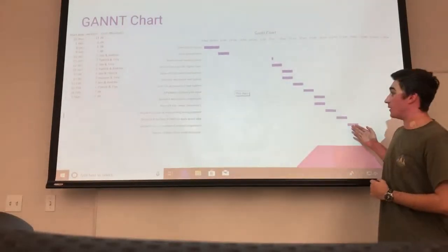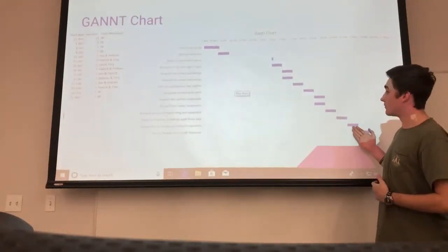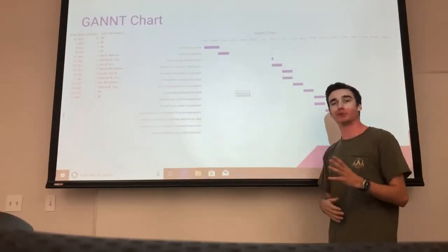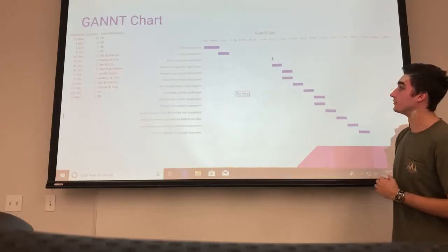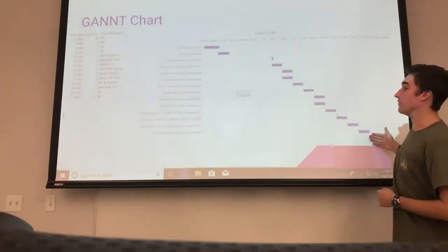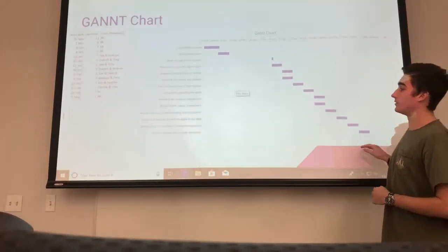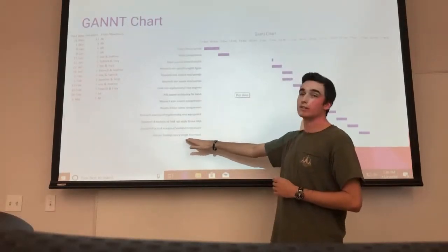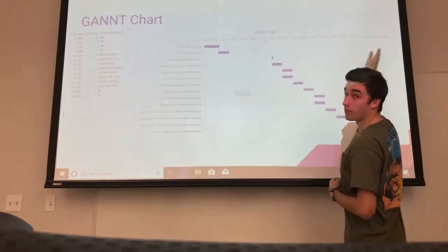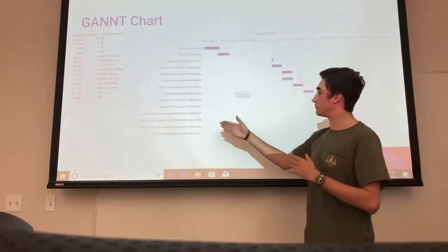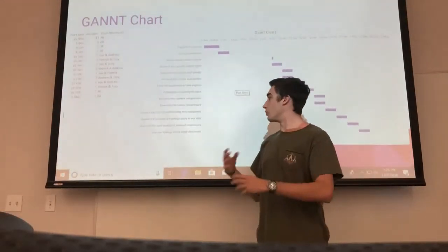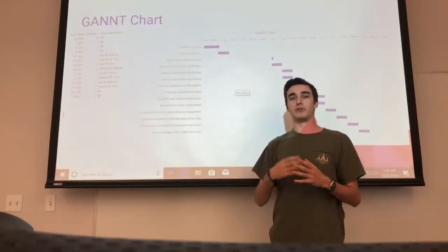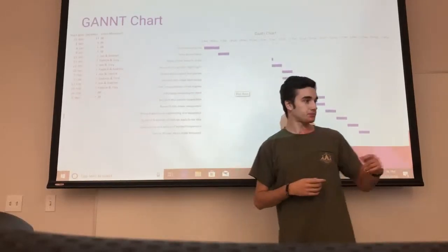Moving on to the 26th of February, nearing the end of the semester, all 7 of us will research the cost analysis of pumps and compressors to see which ones work better, which ones aren't as cost effective. And then finishing it up with the 5th of March, ideally, all 7 of us will join all of our findings through the entire past 2 semesters of research into one single document. And that will leave a whole month before April to condense our findings and formulate it better and make it apply better to our final presentation.